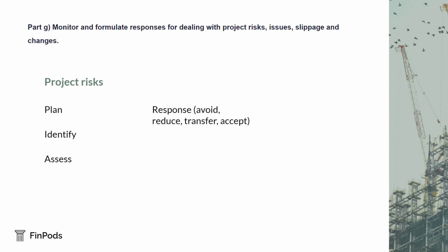Transference. The risk is passed on to someone else, perhaps by means of insurance or possibly by building it into a supplier contract. Absorption or acceptance. The potential risk is accepted in the hope or expectation that the incidents and consequences can be coped with if necessary.